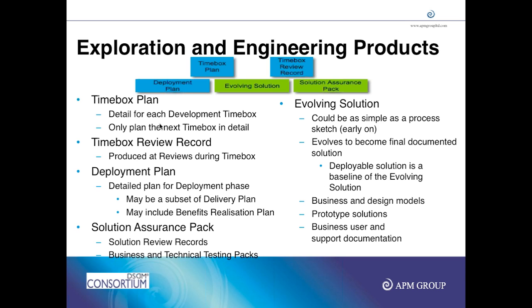The deployment plan is actually the release plan, you can say, or you can also say release plan means release on the production environment. You can also call it installation scripts, release notes. You can also have any training plans that are required, any data migration plan, any backup restore strategies. Apart from that, any kind of constraints that we have, training documents, handovers, all of that is actually your delivery, the deployment plan. One of the subset of deployment plan also describes after the software is deployed, post project, how the benefits realization will be reviewed.